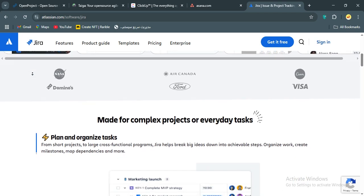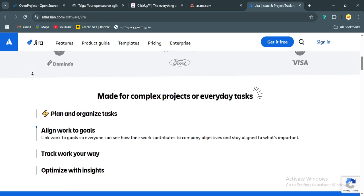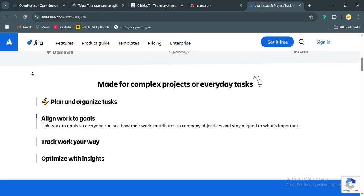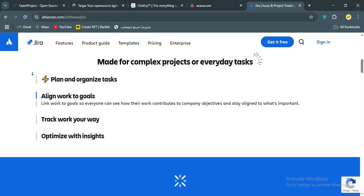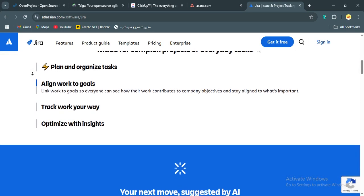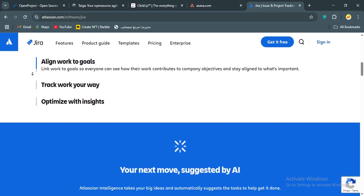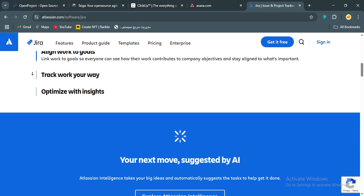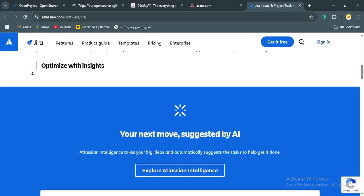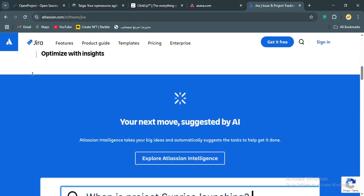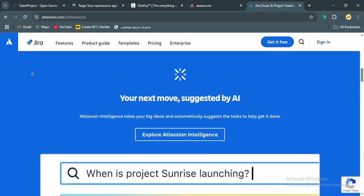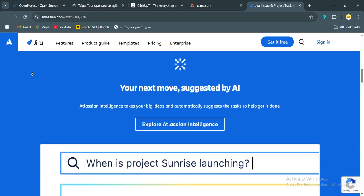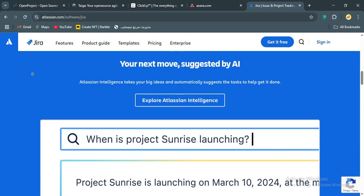What sets Jira apart is its depth. You can build custom workflows, set up sprint automations like moving unfinished tasks to the backlog, and track progress with detailed reports. The cloud version is easy to set up, and the free plan supports up to 10 users. Premium plans start at around $8.15 per user per month, unlocking advanced features like custom hierarchies.